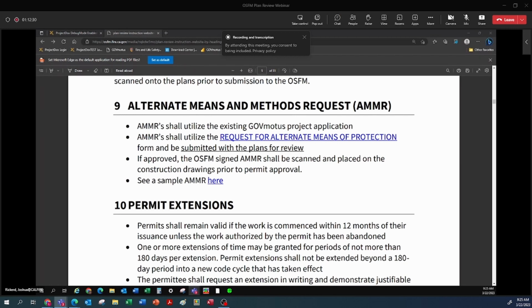There was a question about bid documents. Once the plans with the bid document label are on there, do we need to reissue drawings for the SFM with stamp or label construction drawings? Once you have your documents done for bid and you're resubmitting for final and total approval, you would just resubmit your drawings without your bid document label on your plans, and we would review and approve those.